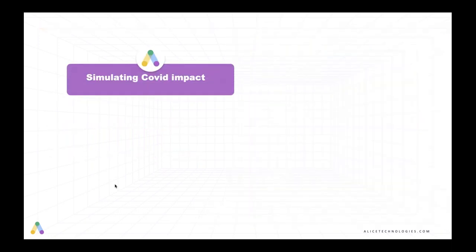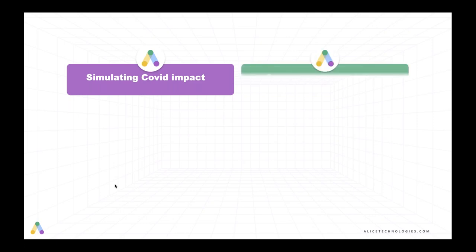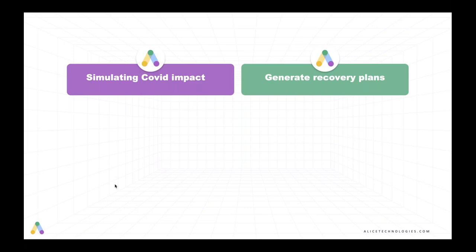On this project in front of you, the COVID impact actually delayed the project by 115 days. A baseline schedule of 922 calendar days was blown out to 1,031 days. Now, using ALICE, the good news is that we were able to generate hundreds of recovery options in a couple of hours and identify a way that they could manage their risk and also recover the schedule as needed.